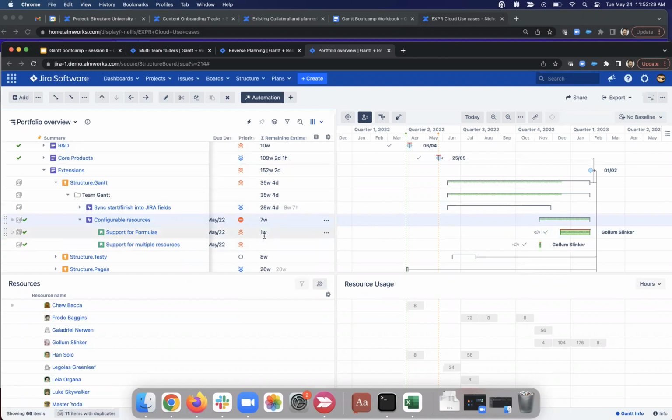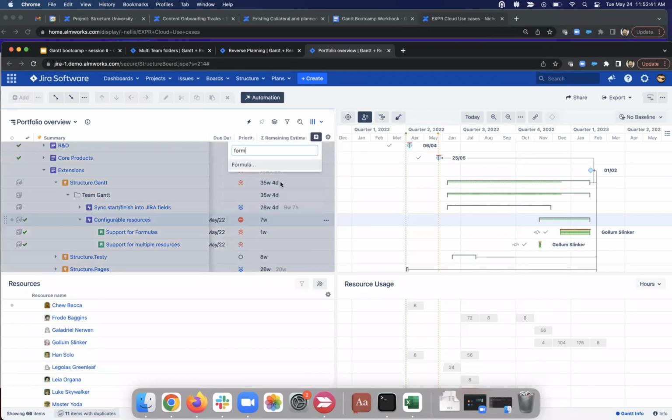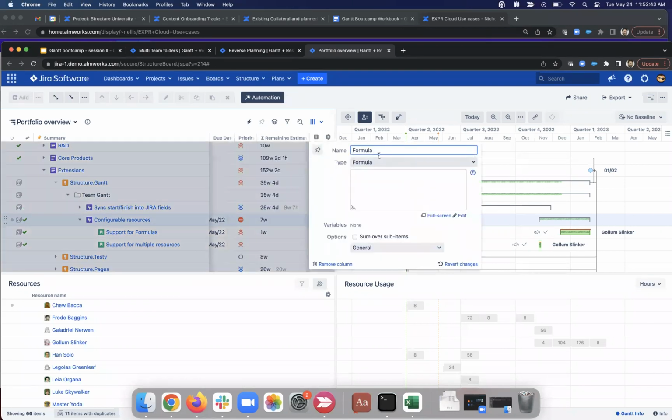So yeah, if we only have values on the stories and we're rolling up, we're only rolling up those story values. But if we have values at the story and the epic level and the initiative level, then we're also rolling up all those. So I think we would want to use a formula. The nice news is that it's a really simple formula. So it's roll up stories only, and we would just do this.